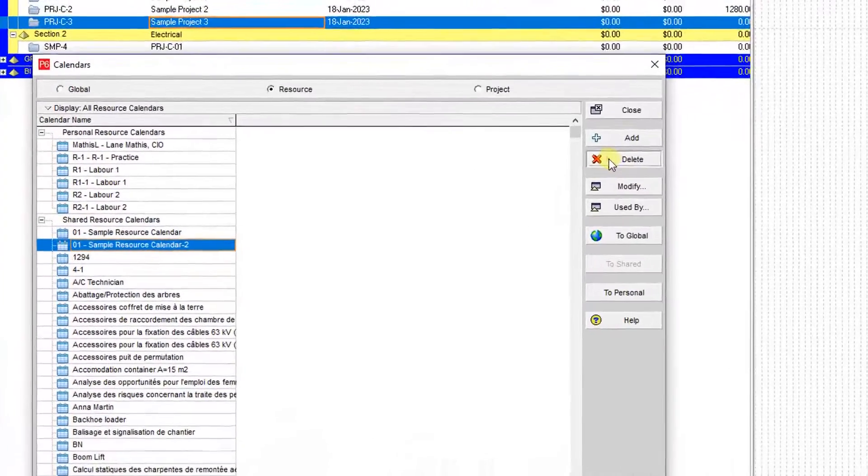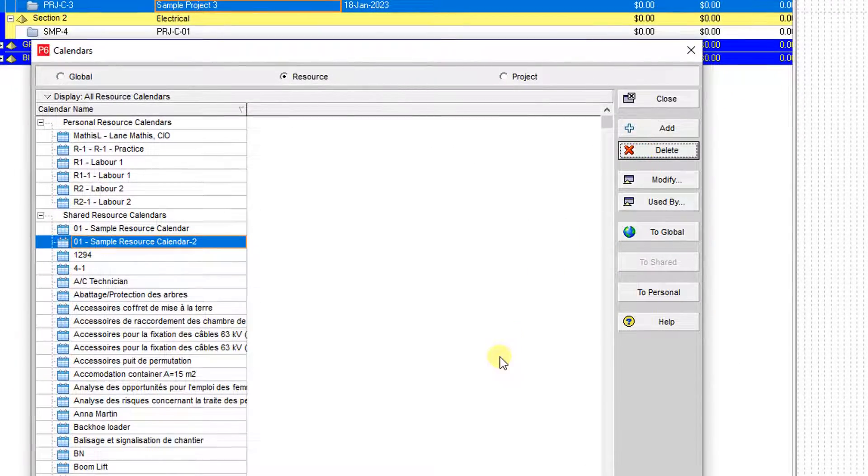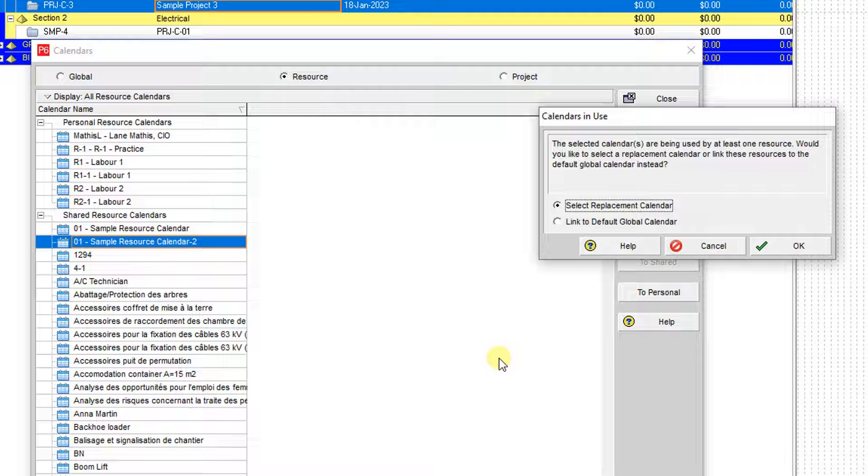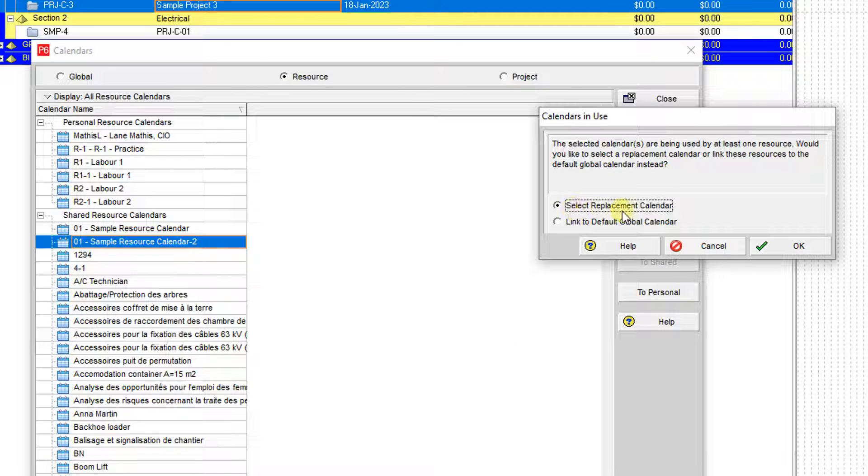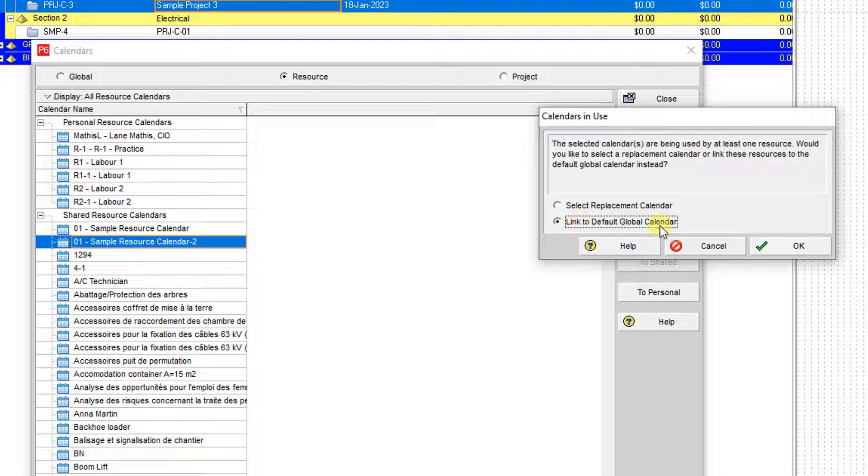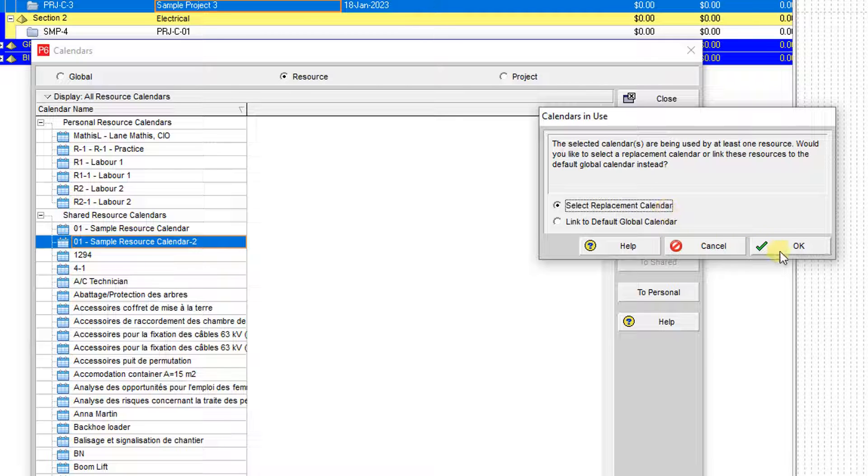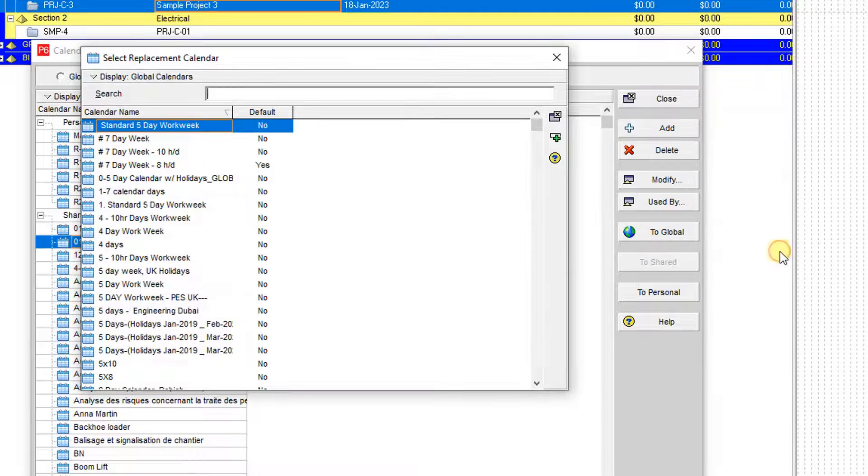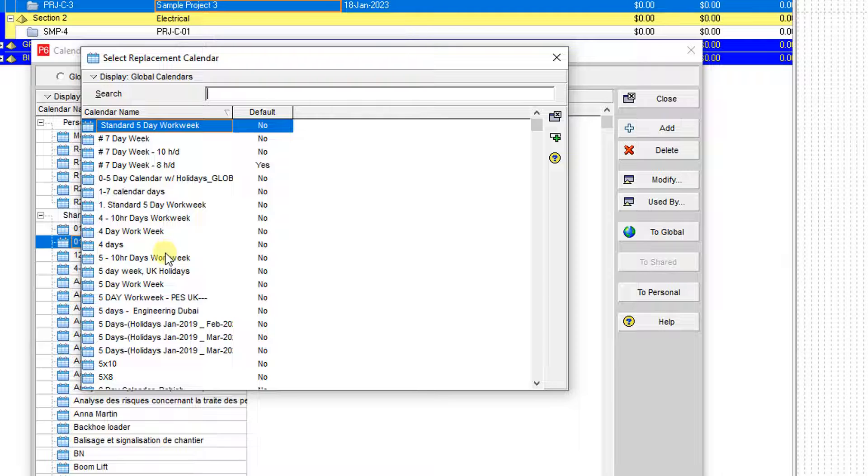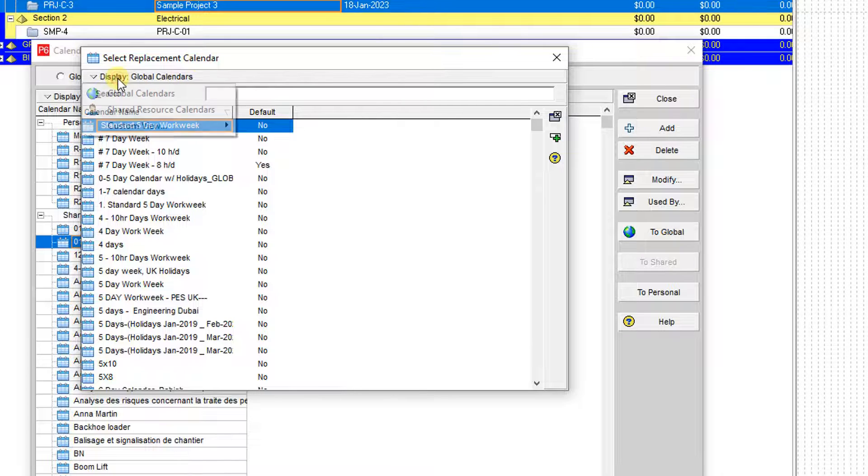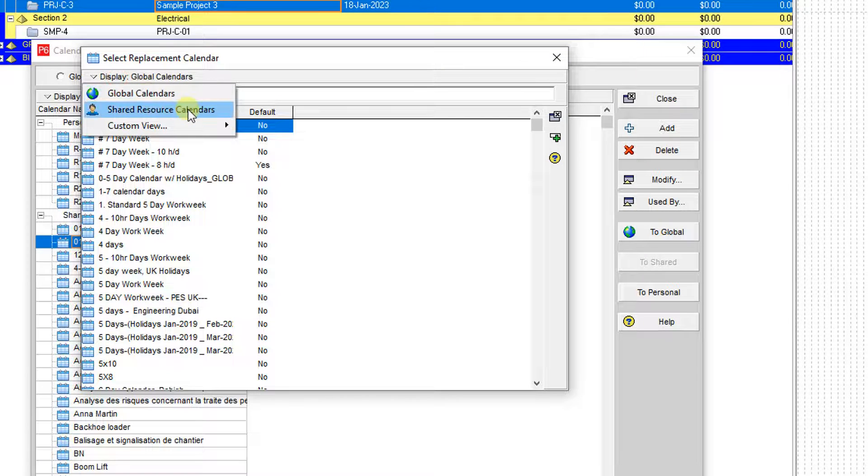If I press delete, then you can find that I should select the replacement calendar or link it to the default global calendar. I don't want to use it as a global, so I want to select the replacement calendar. Then again, the pool of calendars over the global or the shared on the resources.